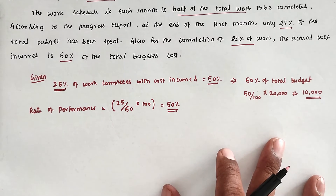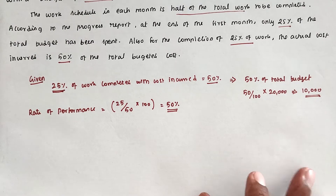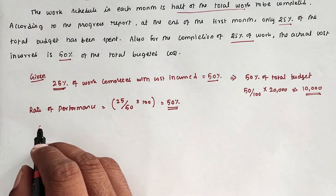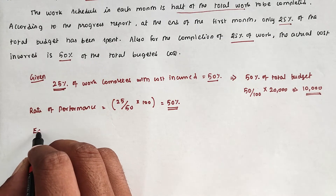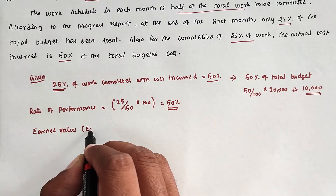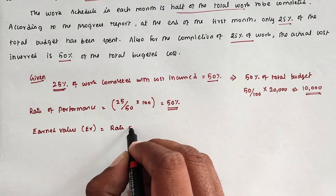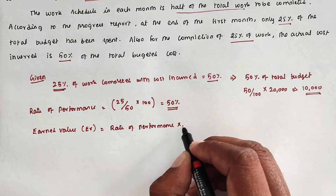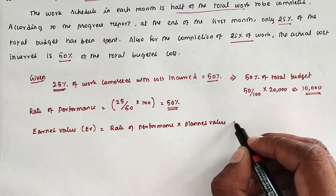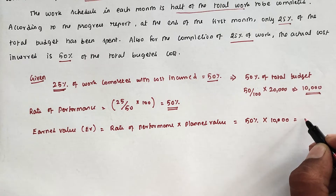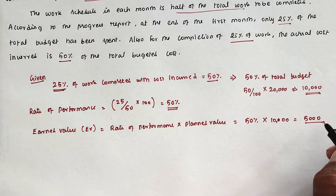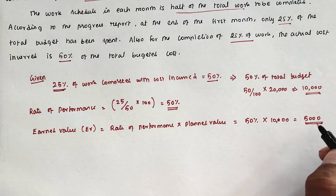So only half of the work is completed now, and 75% of work remains to be completed in the next month. Next, we calculate the Earned Value (EV). EV = Rate of Performance × Planned Value = 50% × 10,000 = 5,000. This indicates the total actual cost incurred is 10,000, but according to the plan only 5,000 should have been spent.